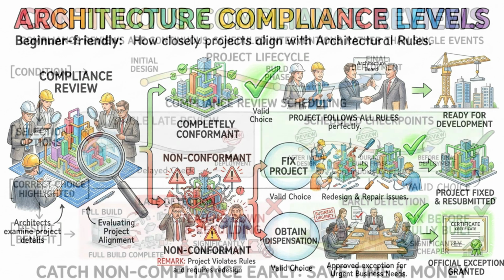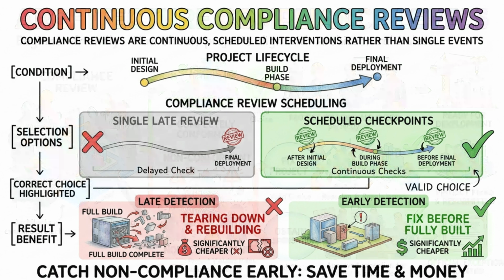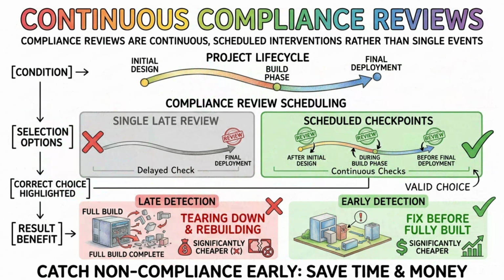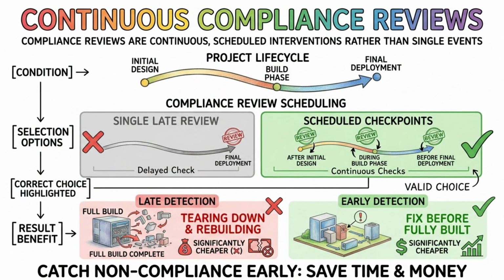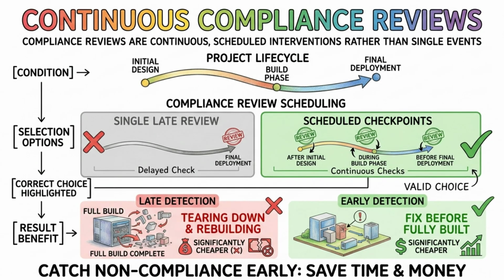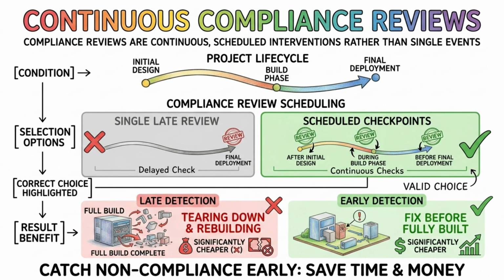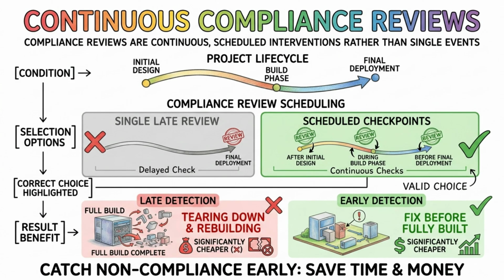The timing of these compliance reviews is just as important as the reviews themselves. Reviews are not just done at the very end of a project, but are scheduled at specific checkpoints throughout the project lifecycle, such as after initial design and before final deployment. Catching a non-compliant system before it is fully built is significantly cheaper than tearing it down and rebuilding it later. Exam questions frequently check your understanding that compliance reviews are continuous, scheduled interventions rather than single events.